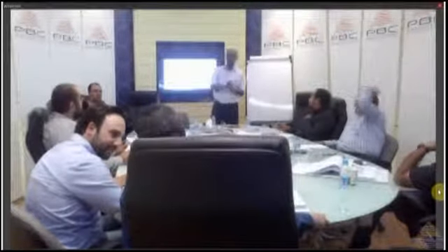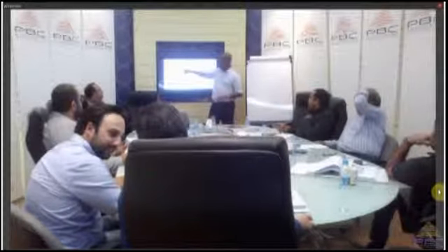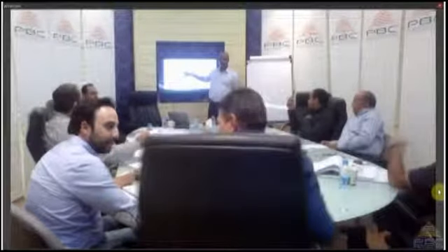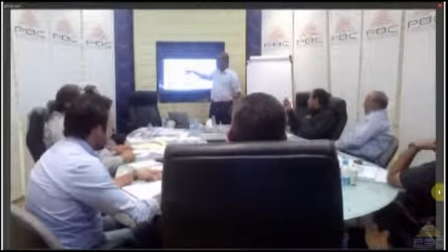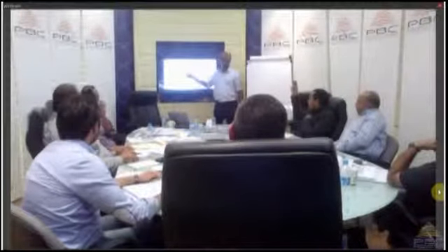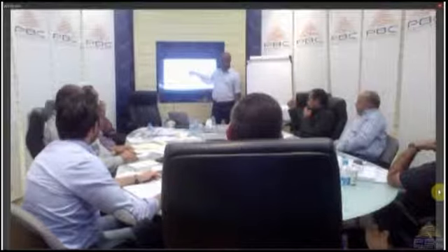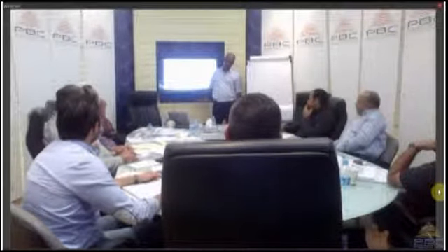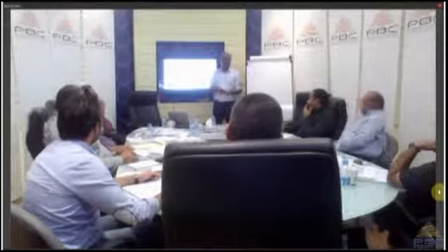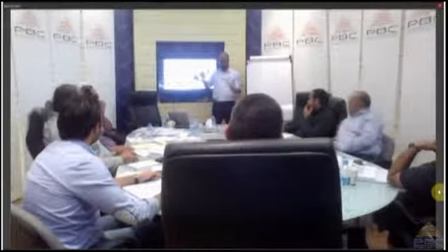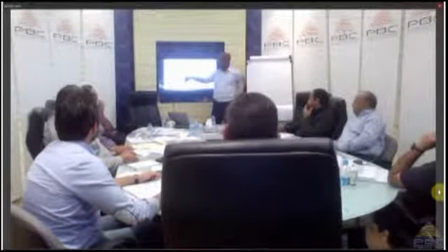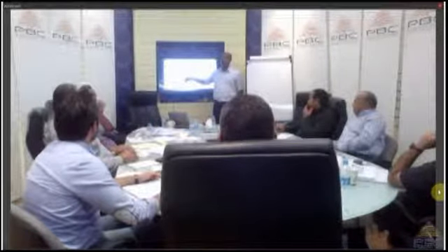Okay, a quick exercise. I want you to tell me what type of cost each is. Don't look at your notes, guys. Inspection? Prevention. Product returns? Failure. Testing? Prevention or appraisal, maybe. Employee training? Prevention. Corrective action? Failure, definitely.